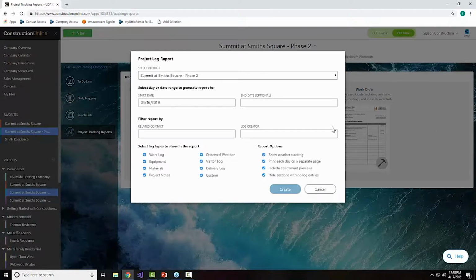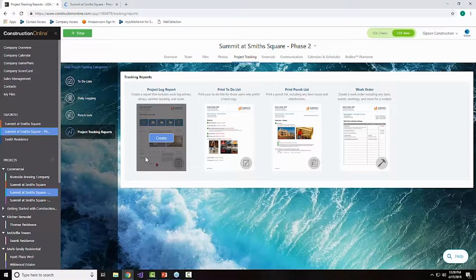There have been changes that have been approved, but not only that, there were weather events that came in, and those things would probably be in your contract. But you want to be able to have something where we can go back and show the client, because sometimes what we see, and I've had these stories reported, is the client will say, well, since we're 6 months past, I'm going to still hold X amount of dollars, or can we call it even on this change order, or something like that.